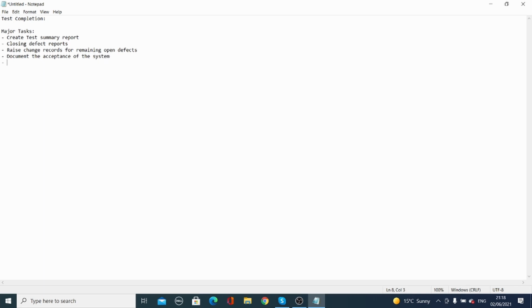So what happens with this one? You are accepting the system, so you need to prepare a report and give it. You need to provide evidence. You can't just say, okay, I authorize that this system is stable and we can accept it. That doesn't work like that. You need to provide the evidence and document it: this system is acceptable so that we can deliver it and start using it.